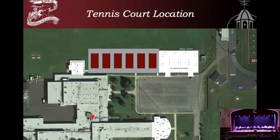We've had engineers look at that space and determine how we could move forward. We've looked at other fixes, like an elastomeric paint with some rubber-like properties that could go over the top. They'll only guarantee that for a few years tops, and it's not a cheap fix. Any fix that's temporary, they're not willing to guarantee for long. So redoing them the proper way with new drainage below would take care of the problem.